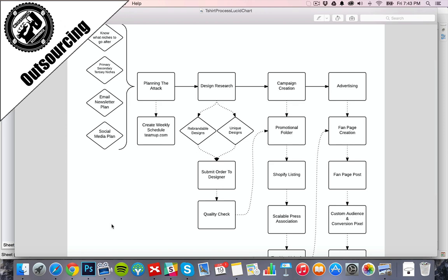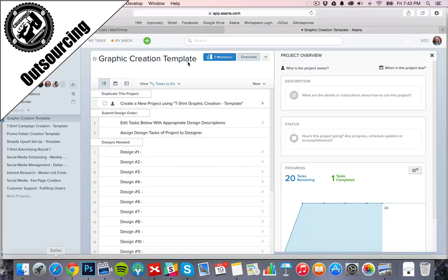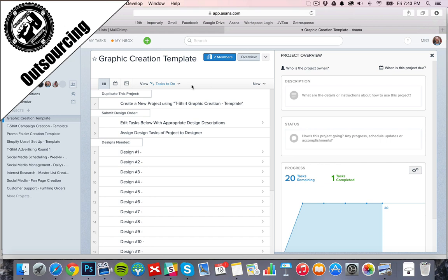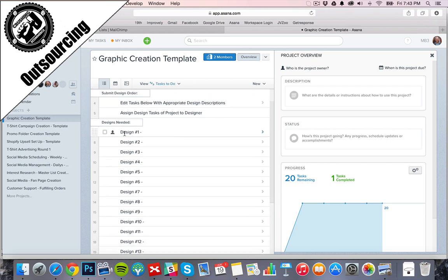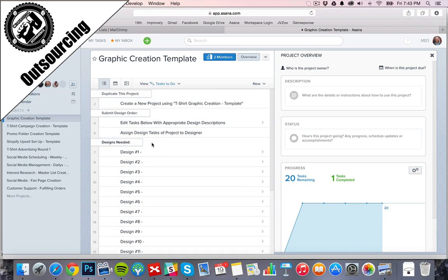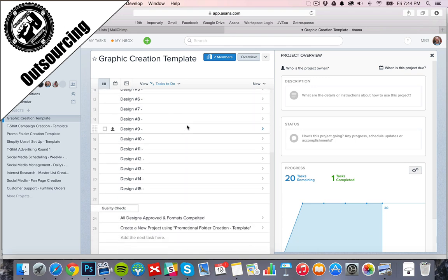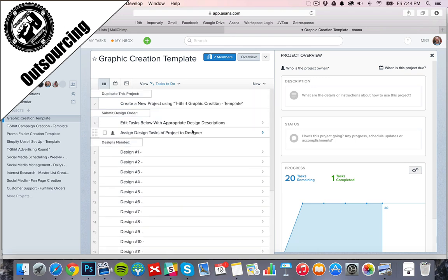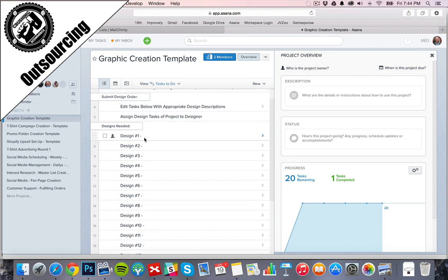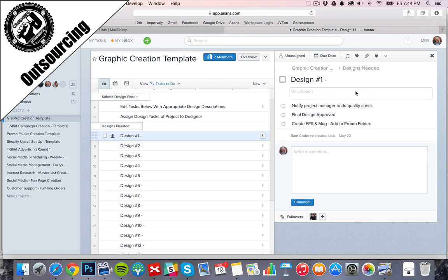I like to use a project management tool called Asana, asana.com. There's a free version. It's pretty much as you can see, it's a checkbox checkmark system with employees here. All my employees are over there that are in the system and we have this templated out where this is the graphic creation template. The initial step of the project is to create a copy of this template and name it whatever the week is. So that's step one. It takes this template I have created on Asana and makes it into a new project assigned to the graphic designer. The project manager will come into design one and add the details of what the design is.